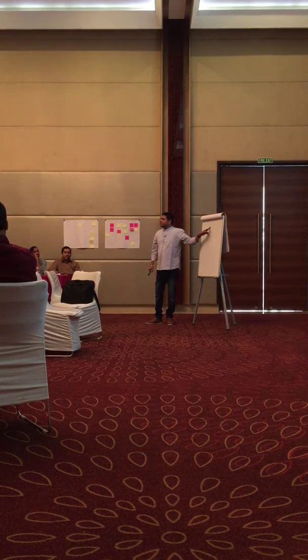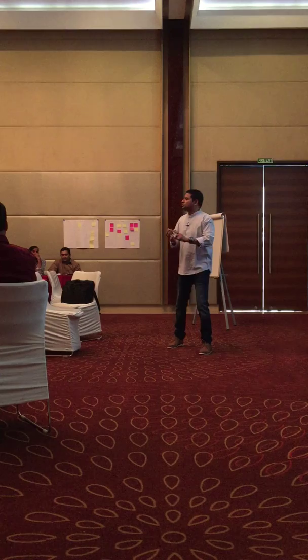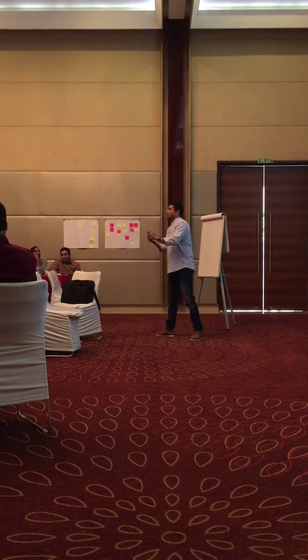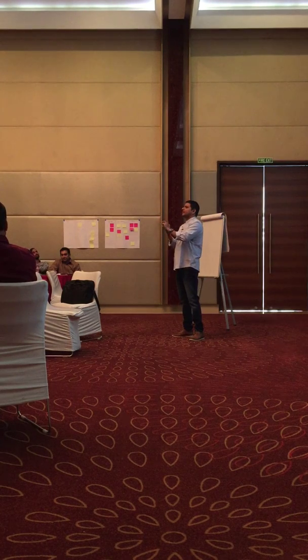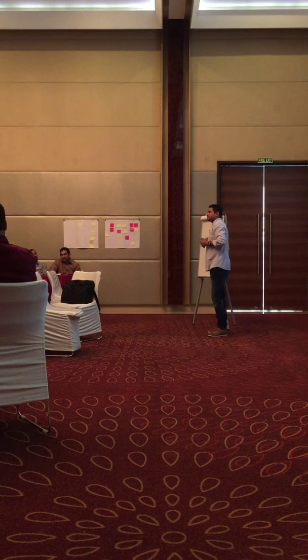Done criteria. Who is giving that? The development team. That means we should be done with the development, we should complete the testing, there should not be any priority one zeros or severity one defects, and code review should be done. At least half of the code should be automated. Like that they define. Together, they form the confirmation criteria.